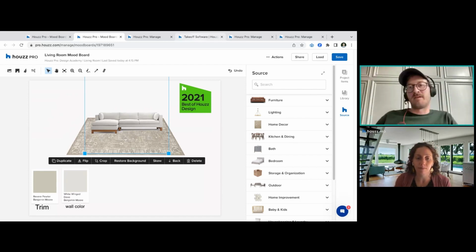A 3D floor plan is a rendering that you build to send to your client to give them more of an idea of what the space looks like. The 3D floor plan tool isn't going to give you a dollar amount for what the project will take, and it's difficult to use a floor plan to get to that estimate. Whereas with takeoffs, you take the floor plan, measure your space, and create an estimate straight from it.